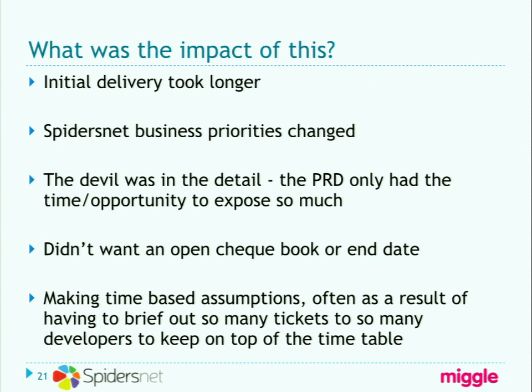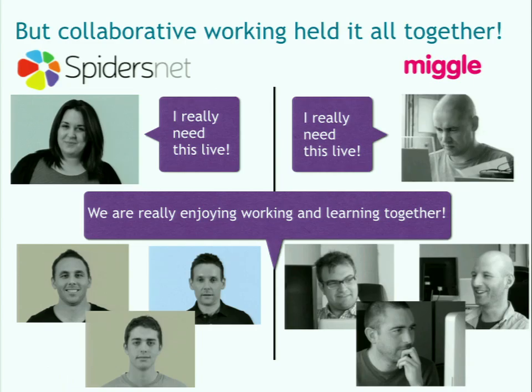So as we started to slip behind with certain bits or as certain requirements became broader, regardless of whether we could buy or charge for that extra time or not, it was often a case of thinking about at the same time, how do we onboard extra developers onto that, explain to them what the project's about, get them up to speed, and try and do that making as few assumptions as possible.